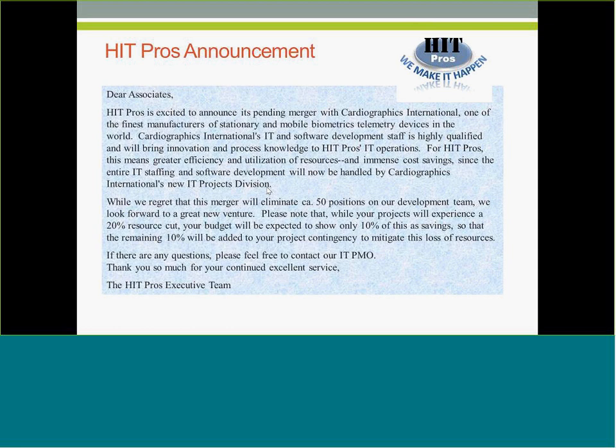And then, of course, your project will also experience a 20% resource cut, which means you had 5 developers before. Guess what? You will have only 4, right? You're losing 20% of the people, but you get to show 10% of this as savings in your budget, and the other 10% you have to put into contingency to pay for risks. And since this change introduces major risks into project completion, of course, the 10% will be very important to have in your project budget.